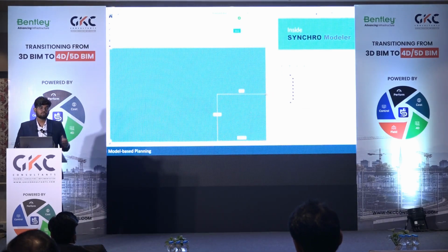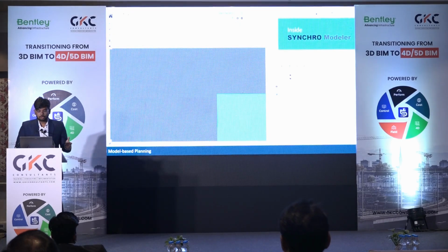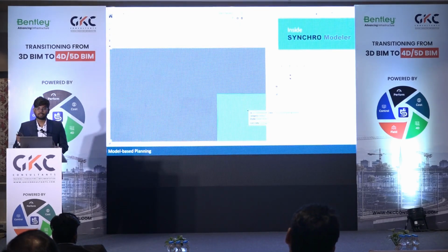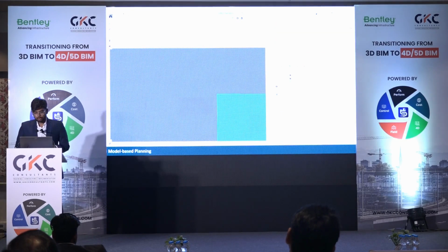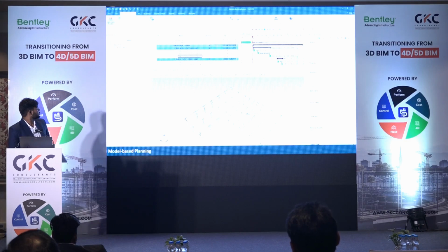Or if you need to break it down by the zones that the contractor is going to work. Keeping those parts in mind, this is where Synchro Modeler helps a lot, making your model much more constructible and practical, which is what you want in your project. Moving forward, by looking at the 3D model, we have planned and added 3 more tasks below it, showing how the slabs are going to be constructed. It also shows the direction in which this construction is going to take place.